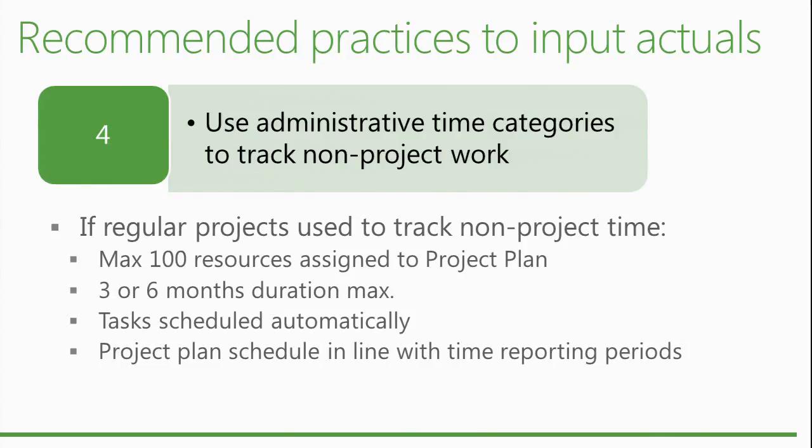Yes? JF, one thing you didn't mention, and it wasn't in the white paper, is if you don't care about daily actuals, report by week. Select that box, it's report by, it's a single number.